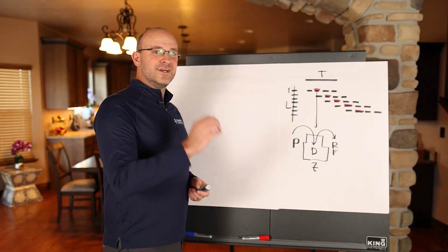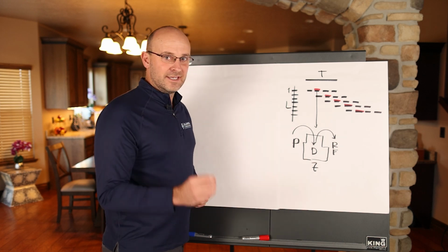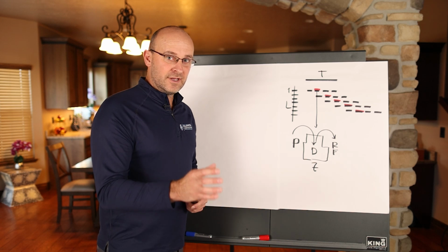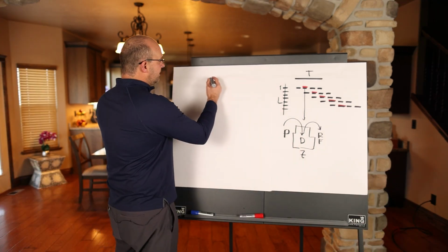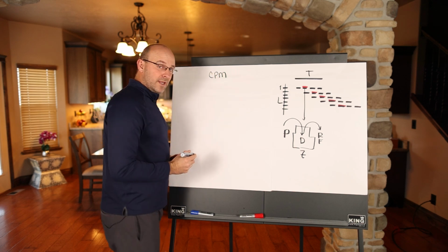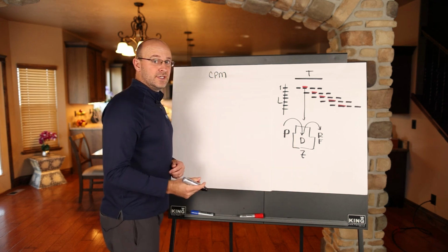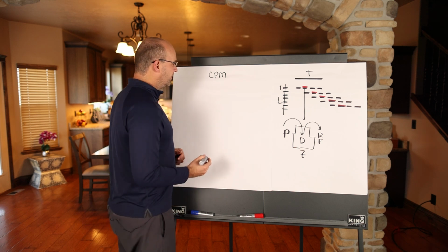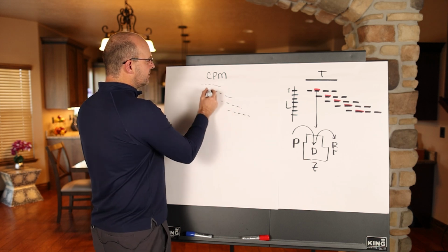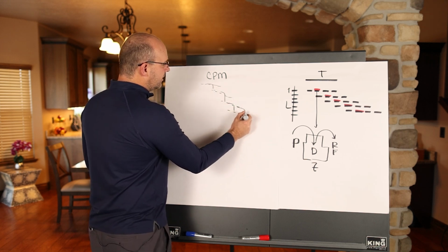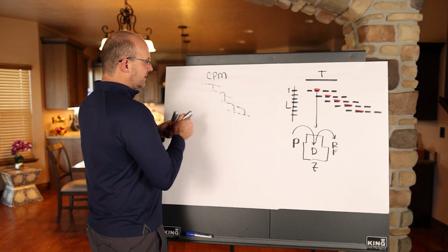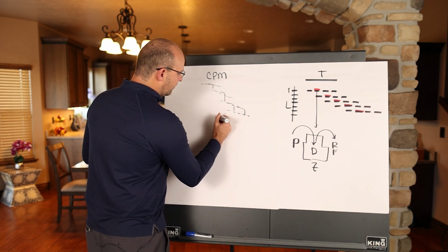So here's what I would do exactly if I was a trade partner and if I was attempting to survive a bad project. So if you are a trade partner on a bad project with a GC that doesn't know what they're doing, you will likely have either no schedule or the general contractor will have a CPM schedule, okay? So a CPM schedule will have your activities in a work breakdown structure, and there will be logic ties throughout. And if you filtered out your activities from this CPM schedule and you did an analysis, your work would look like this.